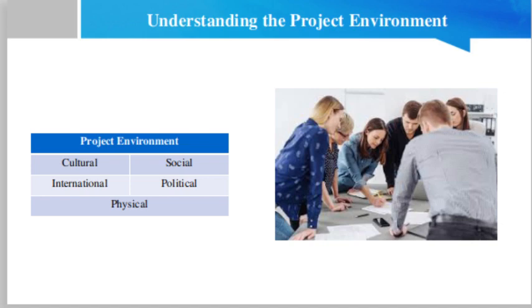How a product is received can be very dependent on international cultural differences. For example, in the 1990s, when many large American and European telecommunication companies were cultivating their new markets in Asia, their customers' cultural differences often produced unexpected situations. Western companies planned their telephone systems to work the same way in Asia as they did in Europe and the United States, but the protocol of conversation was different. Call waiting, a popular feature in the West, is considered impolite in some parts of Asia. This cultural blunder could have been avoided had the team captured the project environment requirements and involved the customer.